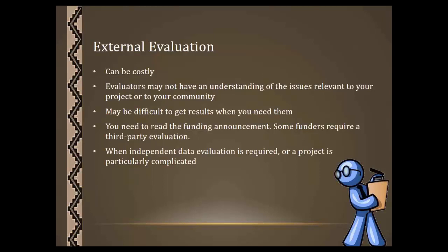It can be costly to hire an external evaluator. You have to interview them and you have to contract with someone, which could also be time-consuming. If you absolutely have to use an external evaluator, it's a good idea to research them during your project development and perhaps even reach out to a few to get enough additional information on the services that they provide. And it would probably also be a good idea to maybe get a price quote from them. This time spent could save you time later.